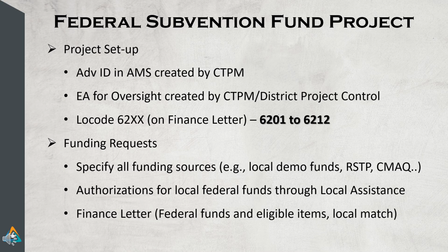The whole process is a circular billing. We are trying to avoid this circular billing by subventing the funds, to have part of the program money come directly to Caltrans, so we don't need to bill the local agency, and they don't bill us back. In the case of subvented projects, once the money comes to Caltrans, it's with the Caltrans capital side, and so the project creation is done by Caltrans Capital Project Management.